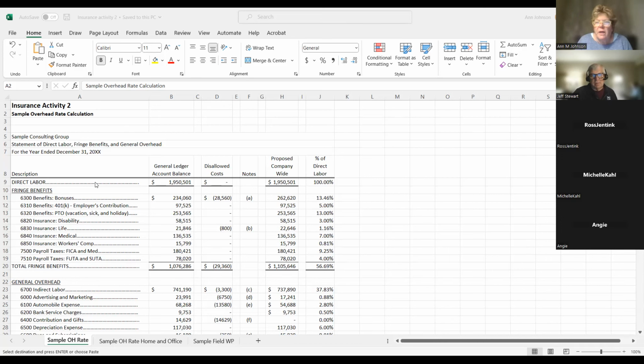Yeah, so basically, and Jeff can correct me if I misstep, overhead is the cost of doing business. So if I pay myself $10 an hour, but it costs me, okay, how can I make this easy? $20 an hour. It costs me $20 an hour to work. And you might think, well, why would it cost you $20? Well, the labor is 10, but on top of that, I have to rent an office, I have to have a computer, I have to have health insurance, I have to have paper, all these other things, right? So overhead is what it costs to employ me. So it's not just the wages, it's the cost of me working.